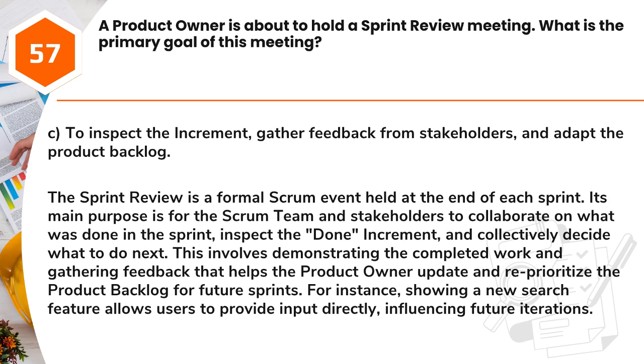This involves demonstrating the completed work and gathering feedback that helps the product owner update and reprioritize the product backlog for future sprints. For instance, showing a new search feature allows users to provide input directly, influencing future iterations.